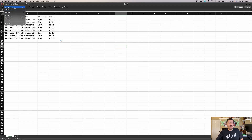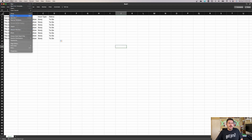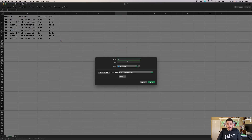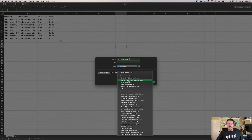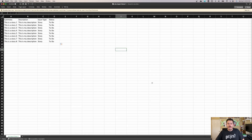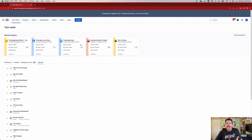Now we're going to step number two, which is the second most critical step: saving correctly. You cannot just hit File > Save and accept this as an Excel file type — that's not going to work. Make sure when you hit save, you change your file format to CSV UTF-8. This gives you that comma-delimited file, which is what Jira is going to accept. Click save, remember where you left it, and you can close the spreadsheet because you won't need it anymore.